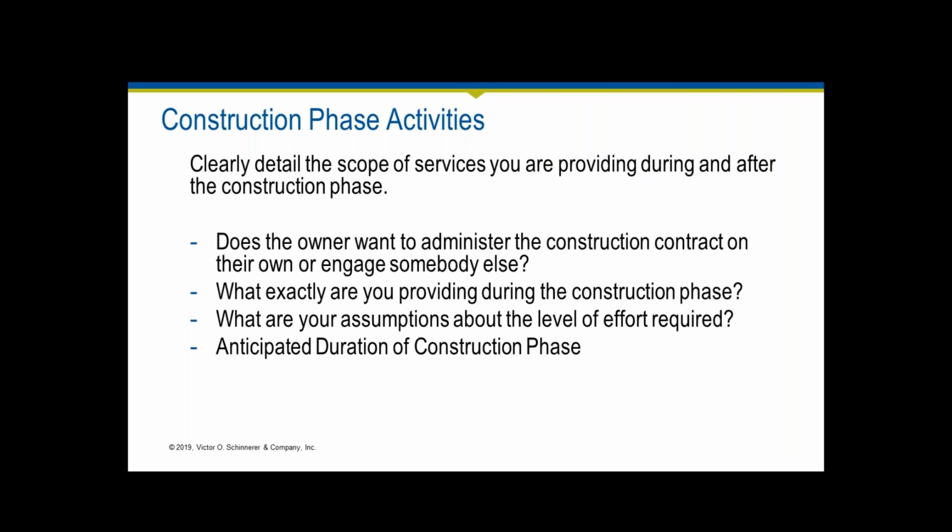If they are engaging somebody else or they want to do the work themselves, what do they expect you to do? Do they expect you to respond to the RFIs, the shop drawings, or some other combination of services? That needs to be detailed out and clearly identified in the scope of services that you're providing to the client. You need to detail your assumptions about the level of effort required.